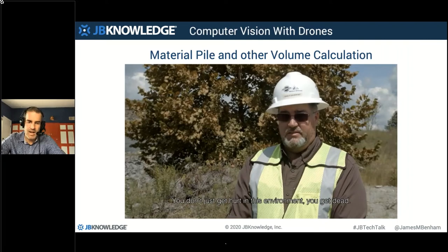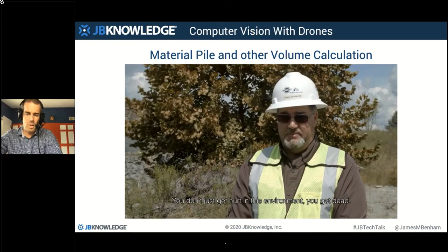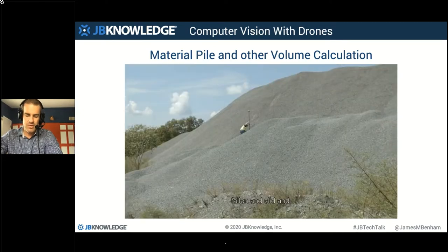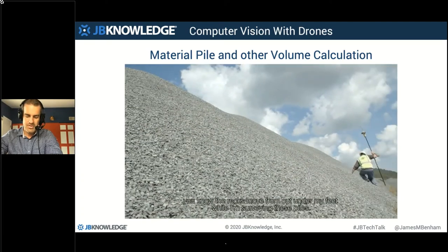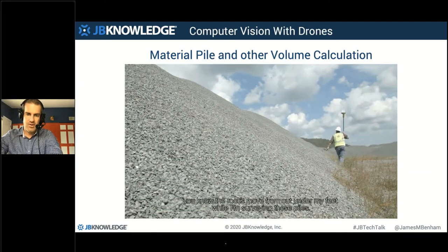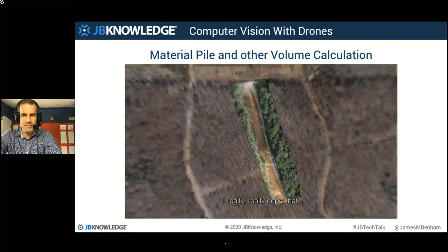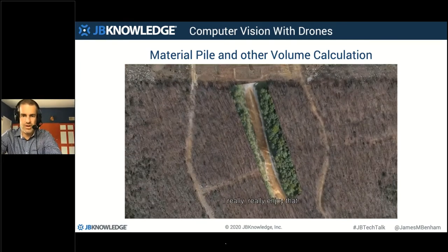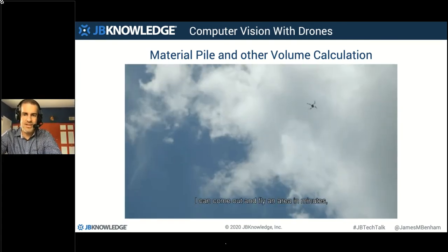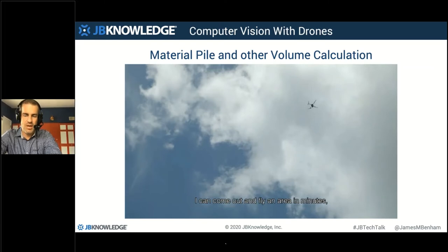And again, I briefly mentioned drones. If you have to measure material piles, this is a big problem, and you can have a lot of waste due to improper material pile measurement. You can see here that instead of that guy climbing the material pile with a stick, you can now launch a drone in a matter of 2 minutes, fly the site, capture the data, upload it, and then do all of his volumetric assessment of material piles.